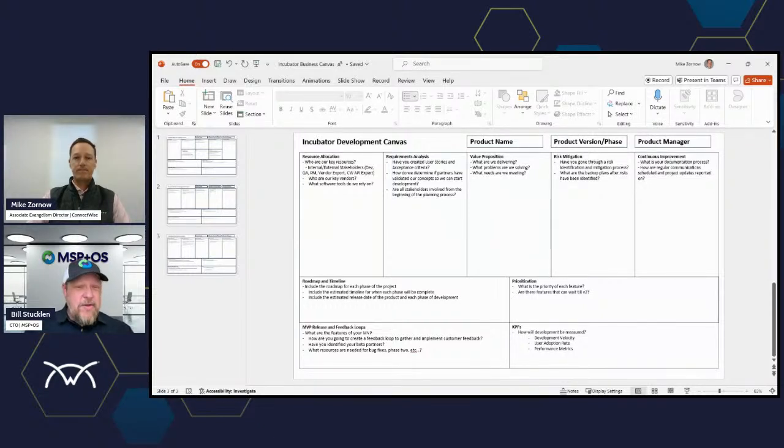And again, it's something we try to help folks understand. Is this a 3-month integration or a 6-month or a 9-month integration based on the complexity? We know that there's some low-hanging fruit and some of the simple stuff that you get into when you start to look at pushing data in. One-way sync is a lot simpler, or one-way push is a lot simpler than doing an actual data sync, because once you start to do that sync, that's where you can really extend the timeline by having to map components, right? So that you can bring things back and forth.